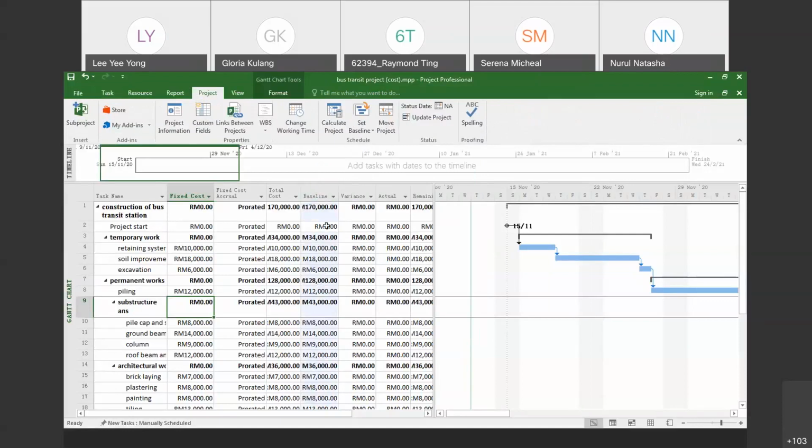Why do we need to save first before we start the project? We need to save our plan first as our baseline. If anything changes later on, you can always have your baseline as a reference. It's like when you do your report submissions, you have draft 1, draft 2, draft 3, and finalized. But for a project, of course, there is never a finalized version, as there are always changes. So that is why it is important for the planner engineer to have a baseline.